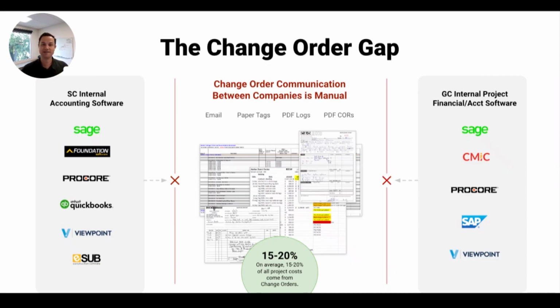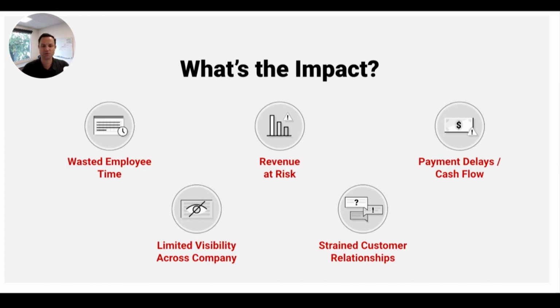And traditionally, that's a PDF document that gets emailed back and forth, and it's inherently out of date. But on top of that, change orders get emailed, review correspondence happens in email threads. And of course, if it's field-directed extra work done on a time and material ticket, it's primarily still done on triplicate carbon copy paper. So again, our tool set allows you to streamline what happens in the change order gap and ensure that you share it with your general contractor in a super organized format. And we give you a tool set to help you speed up the processing time so you can get things to them almost instantly.